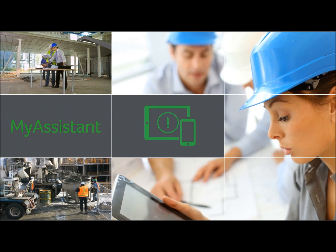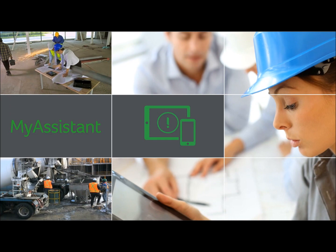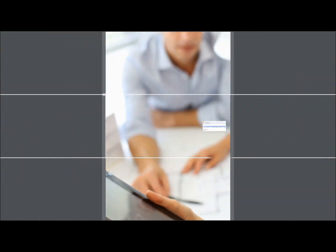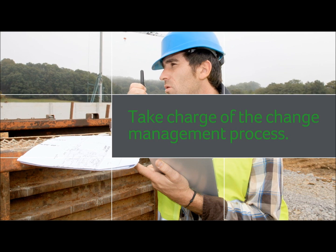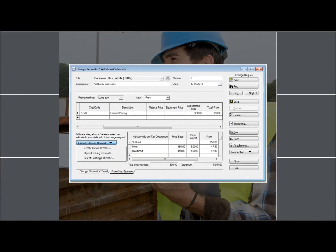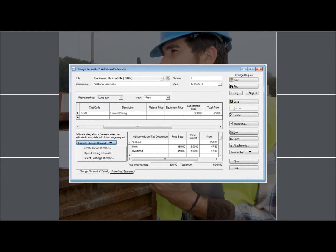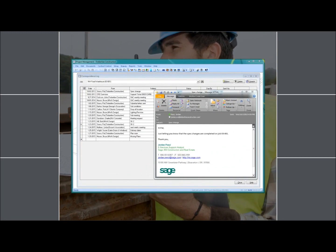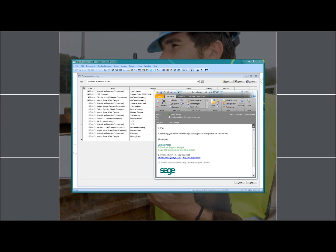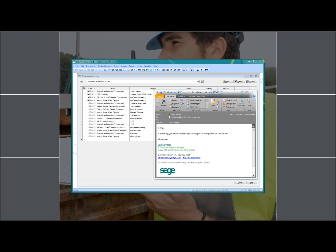With never enough hours in a day, it isn't easy to make time to review reports or other project information, but with Sage 300 you won't miss a thing. My Assistant alerts notify you by email of critical issues needing your attention. Taking charge of the change management process is critical to your business. With project management you can track the path of a change from the initial RFI to the committed change order, ensuring nothing falls through the cracks and every change is profitable. Project management also helps you manage all project documentation and communication in one central repository, easily accessible for clarification and legal support.